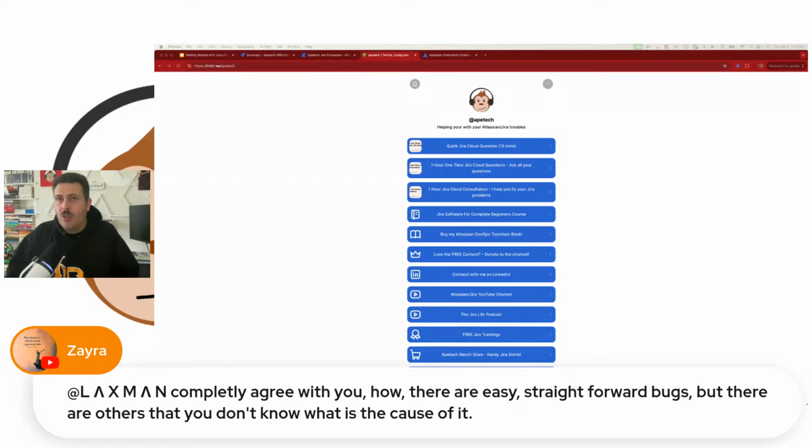You should always capture a bug, you should always create a bug, and you should have a very strict, if you see something, say something policy, and everybody should have the power to create a bug. But you should always look at them first and adjudicate them and validate them before we give them to our developers. I'm of the opinion that by the time something hits a sprint, we have taken care of the unknowns. We take care of anything that's unknown outside of the sprint.